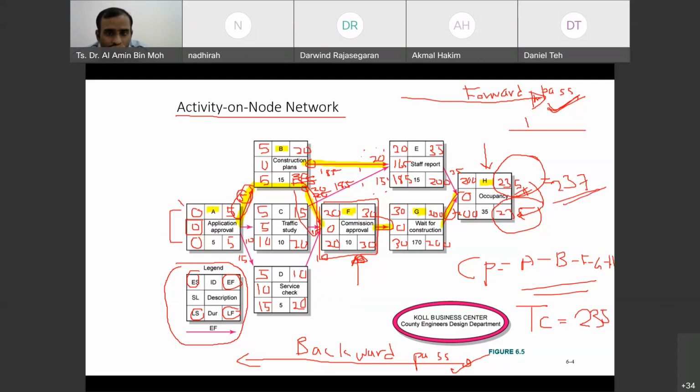But we don't know. Just don't try to say the number of this, because you need to calculate. We don't know whether it's going to give this, right? Maybe it's going to change something else here. So basically you need to explain the situation. Critical activity with 0 slack cannot be delayed. If delayed, it's going to delay the whole completion time.